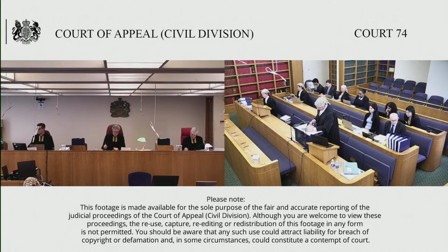In relation to Walney, which starts at subparagraph 6 on internal page 52, there's a final metocean report submitted in January 2006. Now, again, without getting into all the detail of it, it takes a long time to produce a metocean report because you have to study the conditions out at sea over a significant period of time in order to get accurate results.